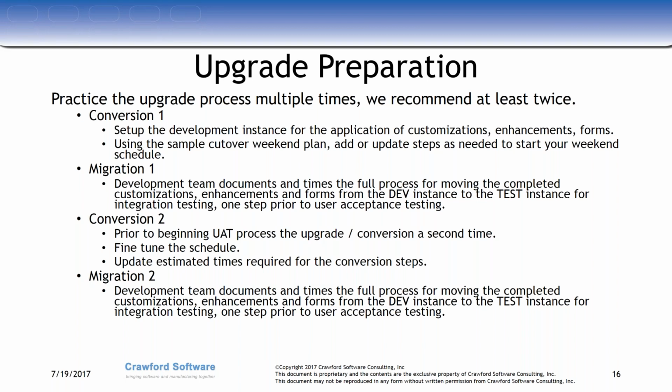But it also helps you get those timings right. Like I said before, we want to be able to set up how long the system will be offline, how long I expect this to take. Going through this process using the solution packs that have already been built, now you've got a good, accurate timeline that I can work to and be comfortable that as I'm communicating this to the end user community, and to my upgrade team, this is when I expect them to be available on the weekend to do this activity.